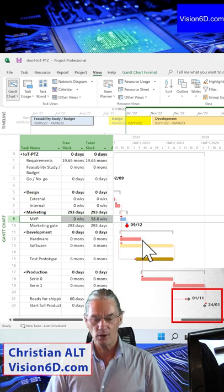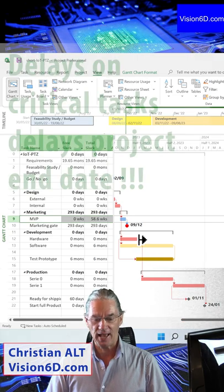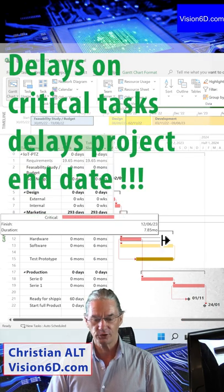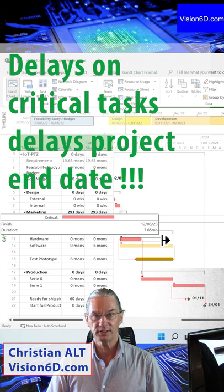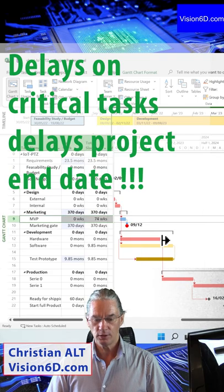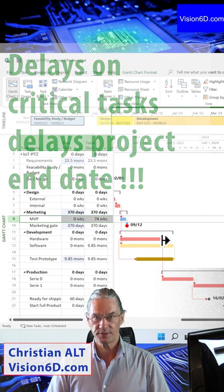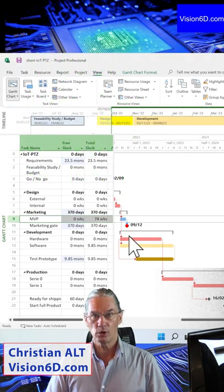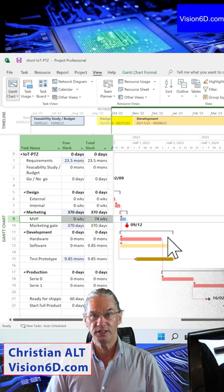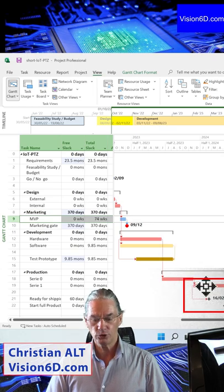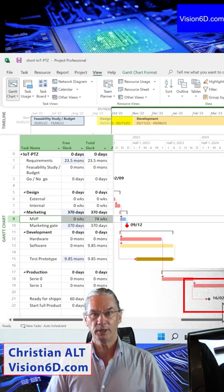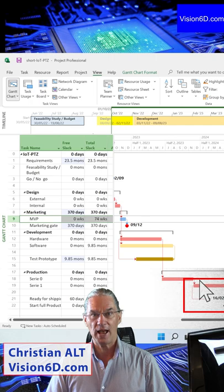If now I take any of the critical tasks which are on the critical path and I prolong them or delay them, you see that the completion date of the project has moved.